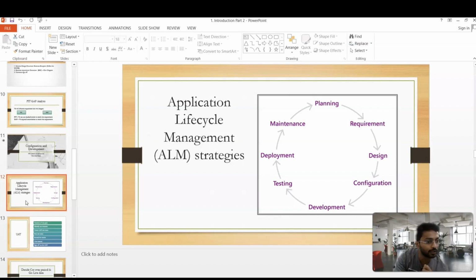Once the functional consultant feels that in the QA server all the customization works as per the requirement of the user, they ask the user to do testing in the QA server. After confirmation of the user, we move the customization into the sandbox server, or UAT server. After we receive confirmation of the user in the UAT server, we move the customization into the production server. This is the stage of customization and development we perform during the implementation.